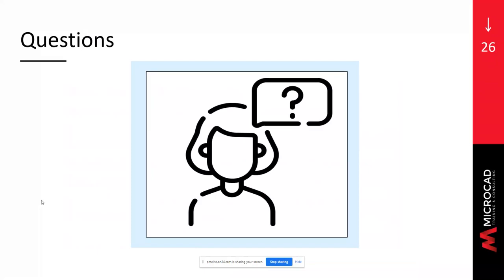That's an interesting idea. And yes, you certainly could do that, because at the conceptual phase, you would want the design flow to be more fluid, and you recognize there's a lot of changes. So you might want to simplify it in the conceptual stage, but then as you move to detailed design, you may want to maintain a lot more information. So yes, that's very possible, but obviously you want to make sure that everyone knows that that's the process you're going to be using. So that would need to be written up in fair detail in your BIM execution plan. But that's a good idea.